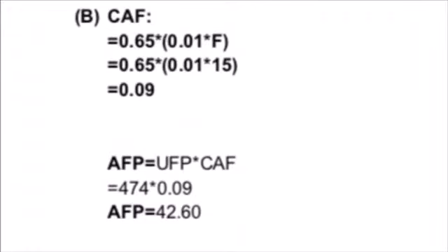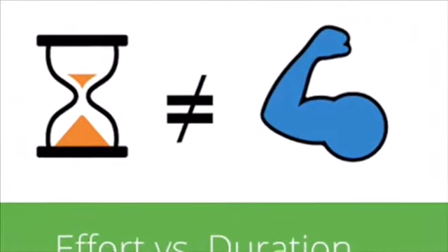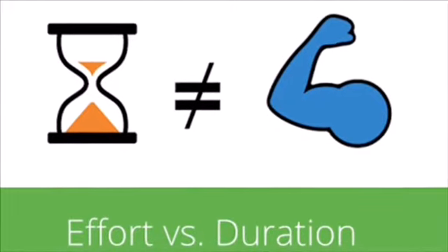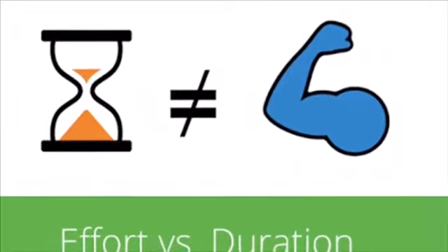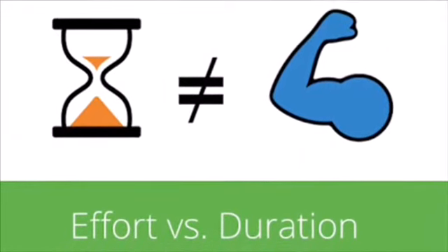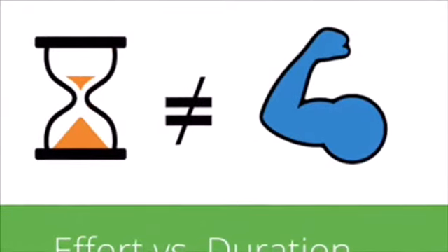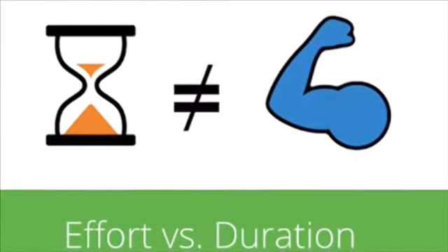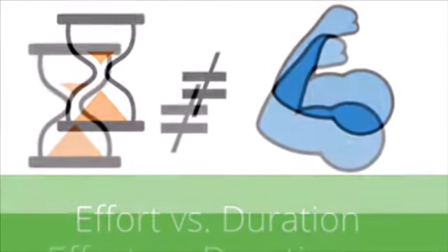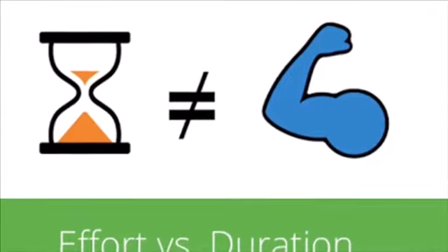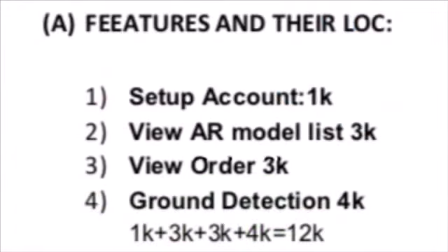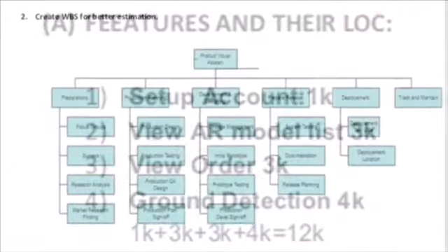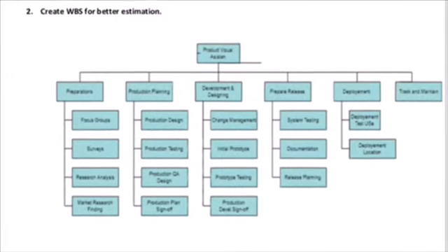For effort, it is in months and persons. Effort of a person in 1 month is 18. Project would be completed in 7 months. Cost of person per month is $500. Persons required for the project: 2. Cost requirement: $7,000.